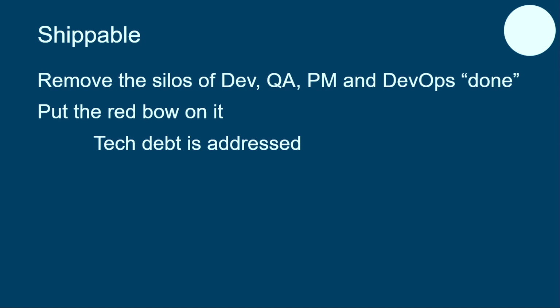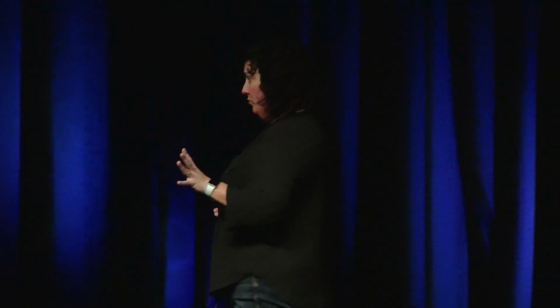So if you, as developers or testers, don't have the ability to write stories, if you need to have somebody write a story on your behalf, get out of the habit of needing to have somebody else write a story. Write the story of tech debt as you're coming up on it, right? So the idea is that we put those stories that address the tech debt into the backlog, and every sprint or so, or every now and then when it gets to the point where it's accrued, we can actually address that tech debt then and there, and we have that fresh memory because we've had the ability to create that story.